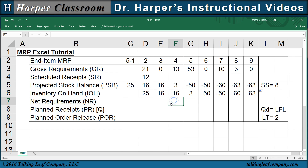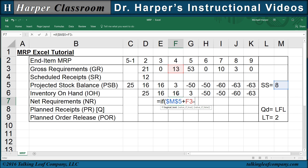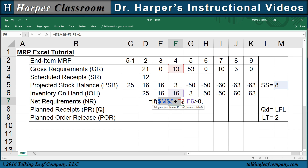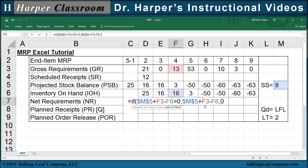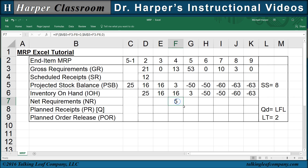Now for the net requirements, that equals: if the safety stock (F4 to freeze) plus the gross requirements minus the inventory on hand is greater than zero, that means our inventory on hand is not enough to satisfy both the gross requirements and our safety stock. In that case, we want this value — that's going to be our net requirements. Otherwise, we want zero. And then we copy that over.